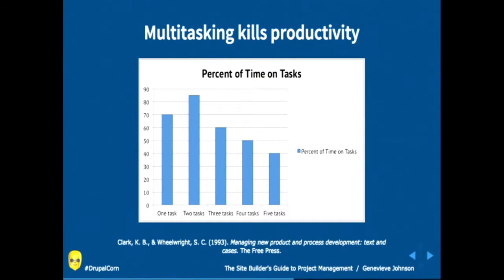So with my group, it's not uncommon that we're assigned to maybe 2 or 3 projects at the same time, but we do try to focus our work. Maybe 1 or 2 weeks we'll focus on project A, and then we'll take a break from that for the next week and focus on project B. So it reduces some of that context switching that you might have to do, and that's where you lose a lot of time. And sometimes you have to get even more granular than that, so it might be even just 1 day or even just a half a day that you devote to one project, but just still reducing all of those switches.